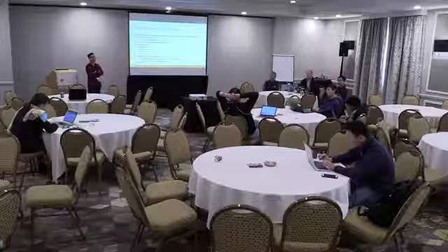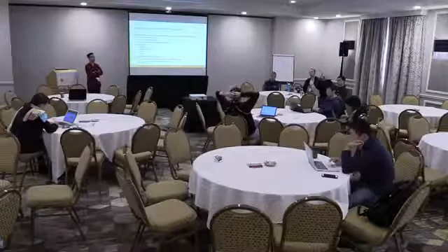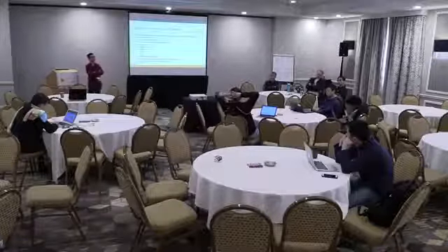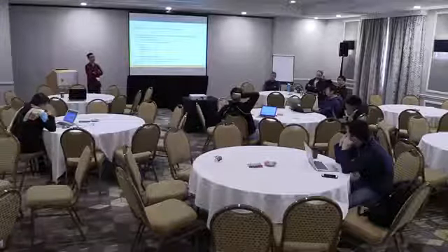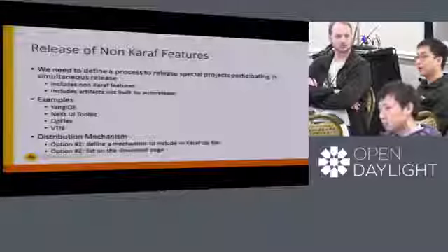Yeah. Right. Actually, maybe we can push the participation in SR release back to the M2 milestone instead of M0. People get approved by a project or the repository, whatever, and after M2 they still do M0 and M2, but at M2 they will say whether they will participate in the simultaneous release. Right. I think that's a good idea too, because